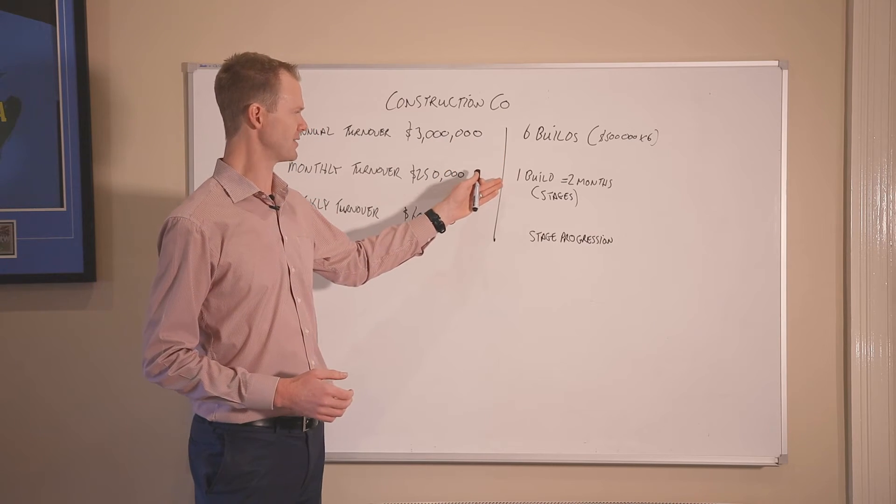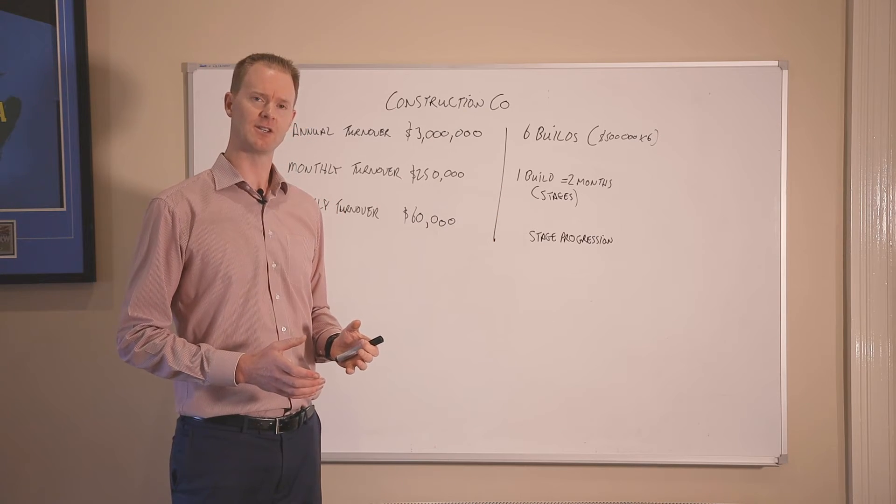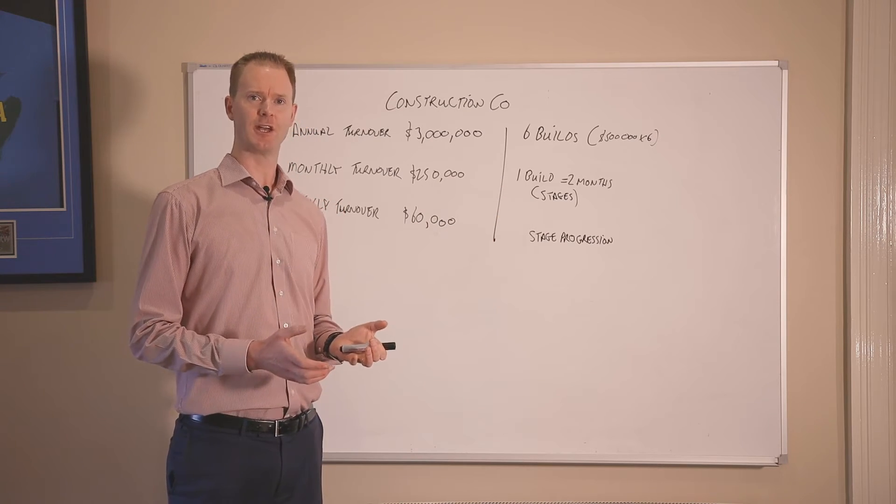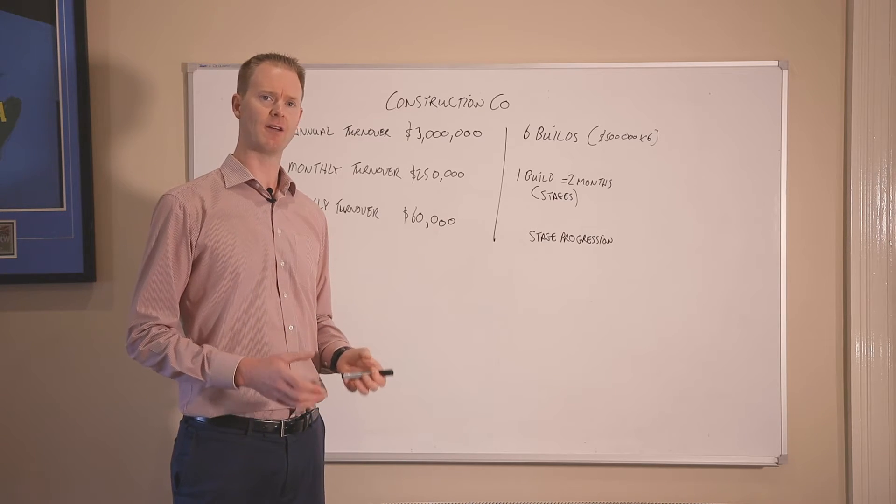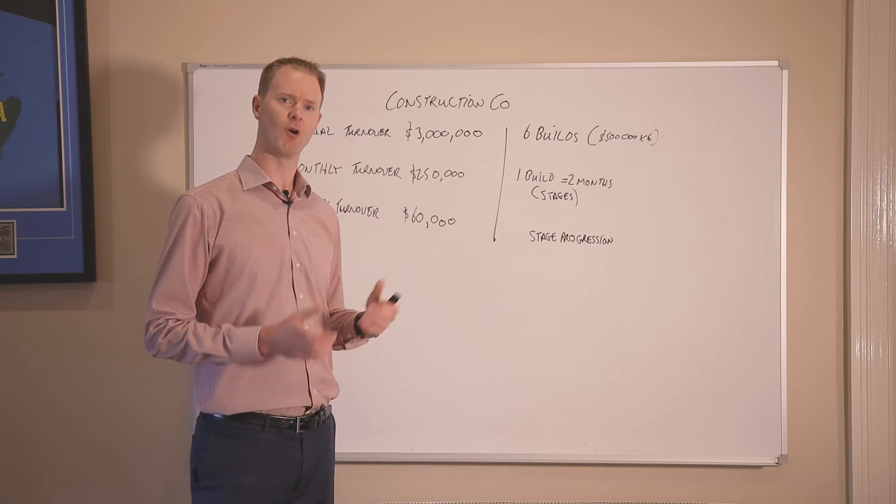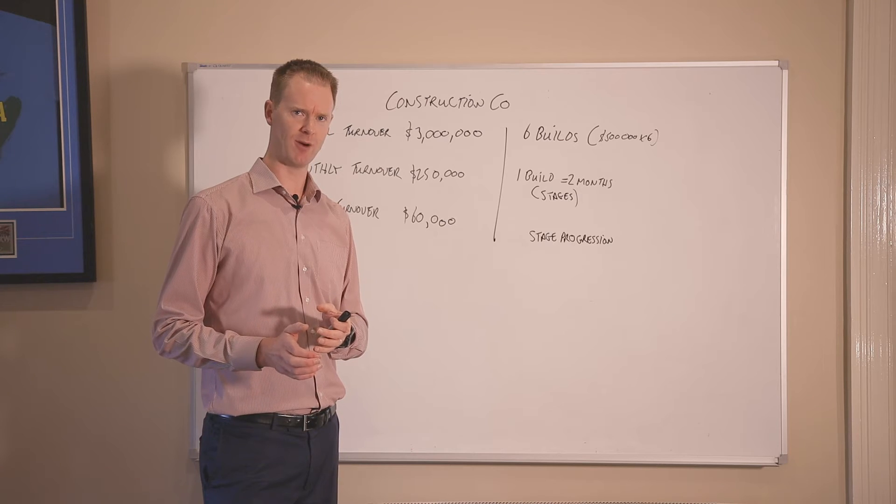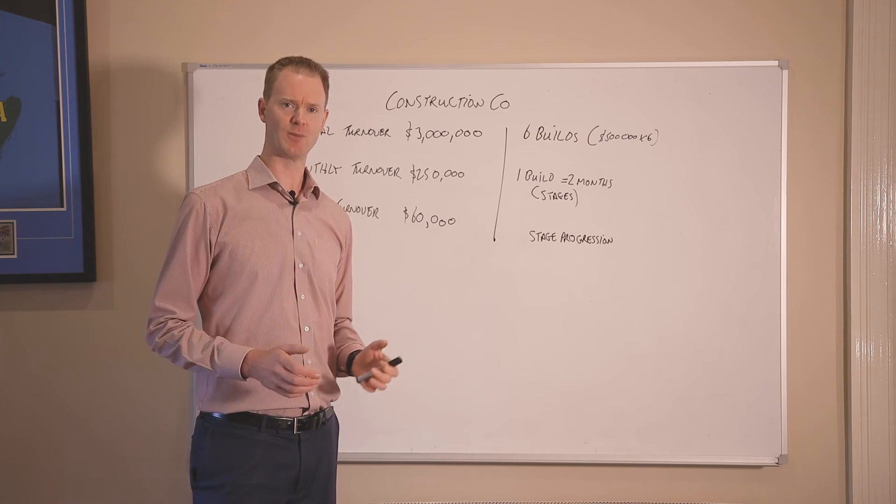So on a monthly basis, you're getting effectively half a house completed. So that's not a measure you can use. But you can certainly work on the different stages of the builds and identify for each of the properties that you currently got under construction, what stage is it up to? What stage will it be up to by the end of the month? And that's exactly the same with the weekly measurement.